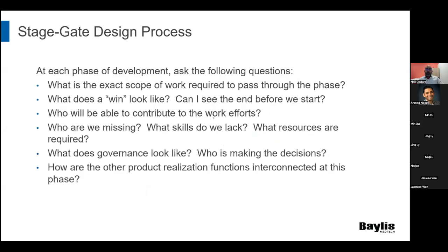All right, so I won't go through all of this, but for each of our phases, before we get started, we have a very specific meeting where we say, okay, we're starting this phase, let's say the prototype phase. What does the end of this phase look like? What are we going to have in our hands? How many doctors would have tested it? How are we going to know that we've finished the prototype phase?